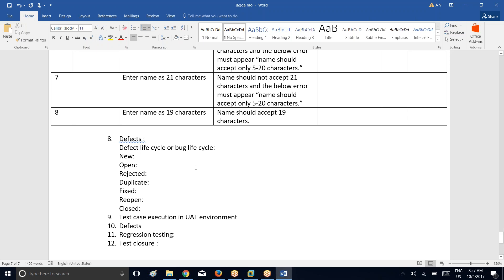Now coming to test closure. During this phase, your project manager or test manager will be involved to sign off the testing activities, and the technical team or development team will be involved to deploy the application into production. Production is nothing but to use or work on the application finally. The project manager will sign off the testing activities only when all test cases are executed, all defects are closed, and regression testing is also completed. Test closure is nothing but to close the entire testing activities.